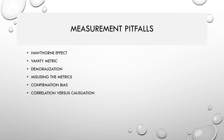Now let's understand measurement pitfalls. The first is the Hawthorne Effect — every metric you choose will impact the behavior of team members. The metrics you choose should not be threatening or cause people to seek a safety net. To avoid the Hawthorne Effect, ensure metrics are aligned with business outcomes. Vanity metrics are metrics tracked for the sake of tracking — they provide no useful information and have no relation to business outcomes.